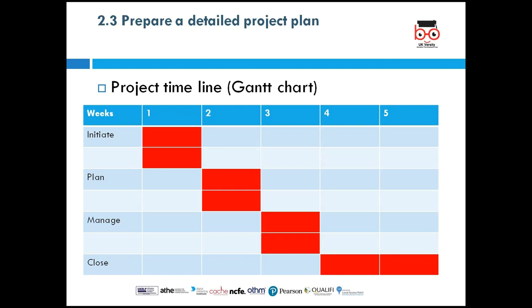So if it's a building we are building, as soon as we finish the construction, we close the project. When you are closing the project, if it's a construction project, for instance, any surplus material will be accounted for. Any surplus money given to you will be accounted for.